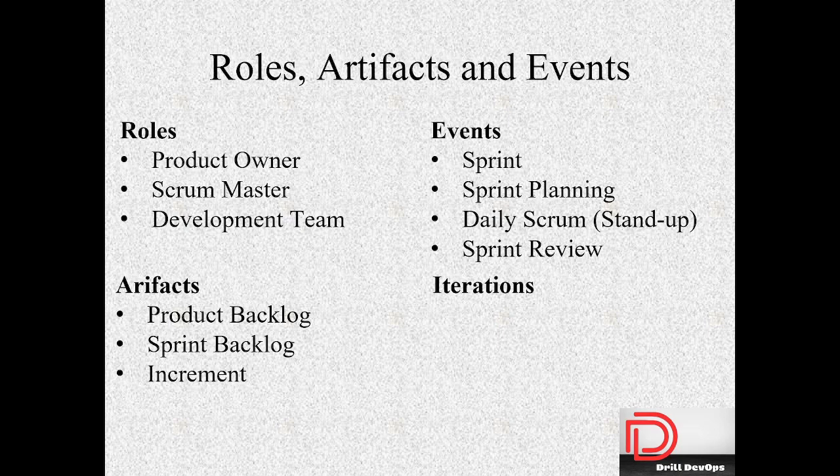Whenever a team commits to deliver items by the end of the sprint, if they fall short of delivering what they have committed, then that goes into the sprint backlog of the next sprint, or it is carried forward to the next sprint. So all these are sprint backlogs, a list of items taken for this particular sprint, which the development team commits to deliver by the end of the sprint. It may change over a period of time in the sprint, as per feedback or when a stakeholder comes in, or if the scrum master sees something going in the wrong direction, they may update the sprint backlog and make sure it is going in the right direction without any delays. So that is what our sprint backlog has.